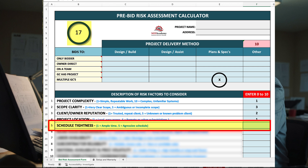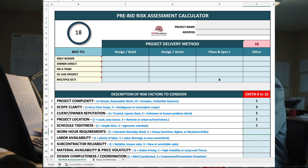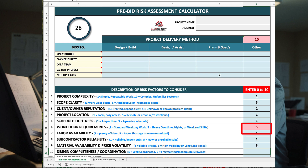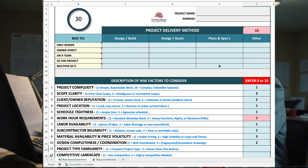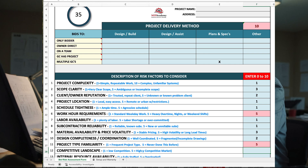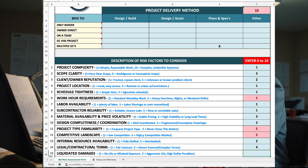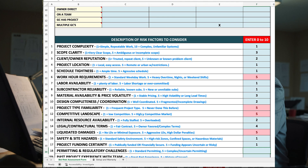5. Schedule tightness: do you have time to build it properly? Score from 1 to 5 — 1 equals plenty of time to meet deadlines; 5 equals aggressive or unrealistic schedule. We won't make you watch us rate all of these, so we'll speed through the rest and show you the results. You can also enter a zero for any risk item that won't be affected, and you can save multiple copies of this risk analysis calculator pre-filled for each of your regular customers, then just fill out the risk factors related to the project. Anything with a score of 5 or higher will automatically turn red — this default setting can be changed to any value. Remember, you can add your own risk factors to this form and the form is fully editable.